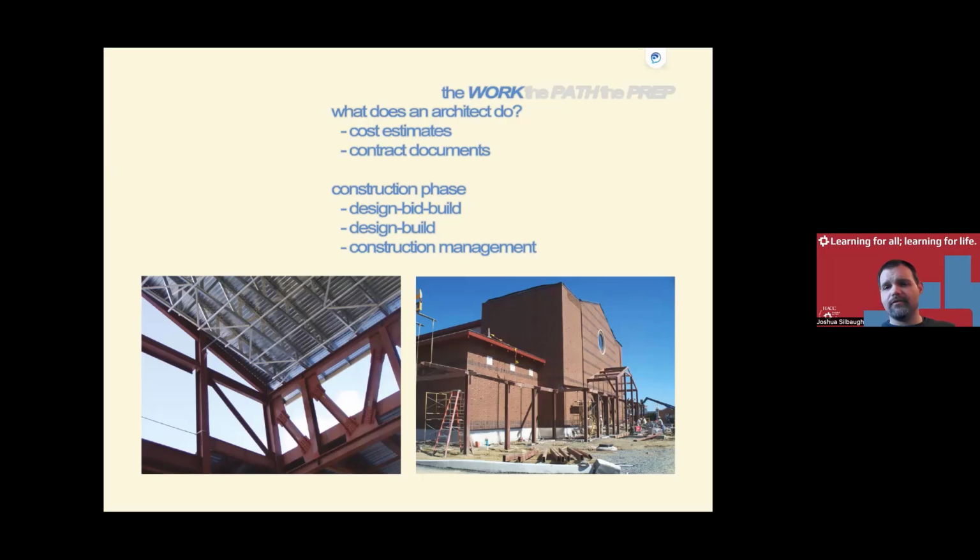There's ways that we deliver projects, and I won't get into the nitty-gritty details, but the traditional design bid build. We design it, it goes out for bid from a contractor, and then it gets built. Or you're working through the design when you're teamed with a contractor in what's called design build.